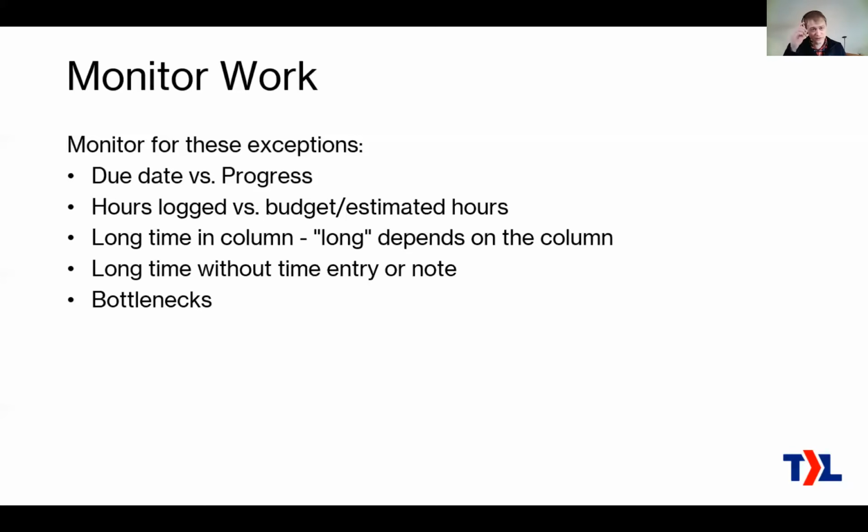You'll want to look for bottlenecks. So that's where you can go back to the horizontal swim lanes that I showed you. And so you can see really easily if one of your technicians has 30 different tickets in various stages compared to other technicians that have 10, there's your bottleneck. Too much work is going to that one technician. So if you can figure out how to distribute that work more evenly in your team, then you're going to eliminate that bottleneck, and your whole team is going to go much faster, because now that one technician isn't holding back a whole bunch of work.